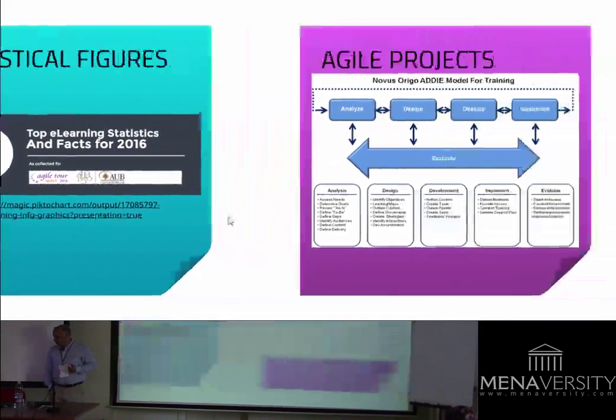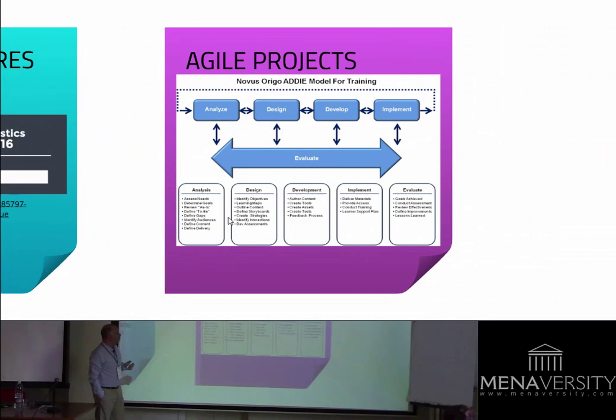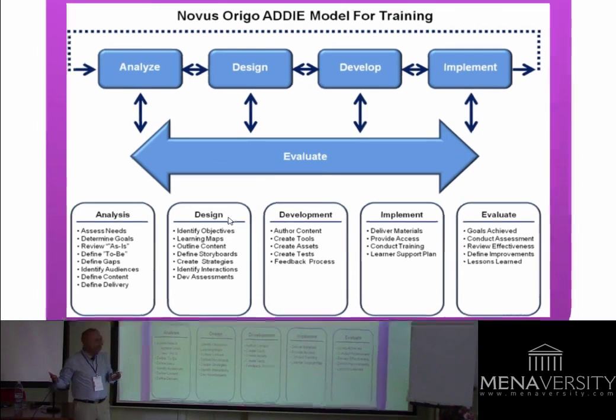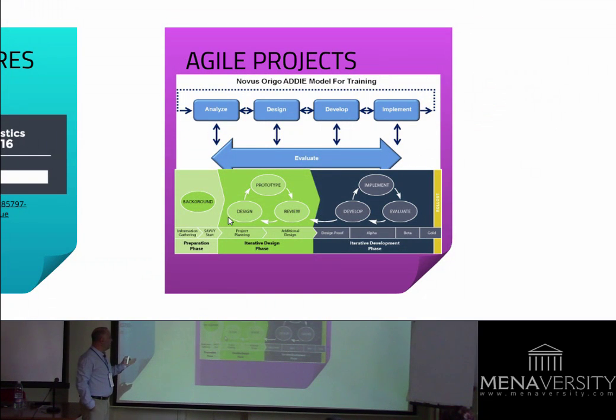Okay. So back to our ADDIE model, what we need to change here is to formulate this model into a more agile model. And luckily, there's another model called the SAM model. SAM stands for Successive Approximation Model. It reformulates what we see here into a different model while making sure the quality is still guaranteed. We start with a very fast kickoff phase, the analysis phase, getting to know the background and the high-level objectives, and then we start the iterations, like every agile process.